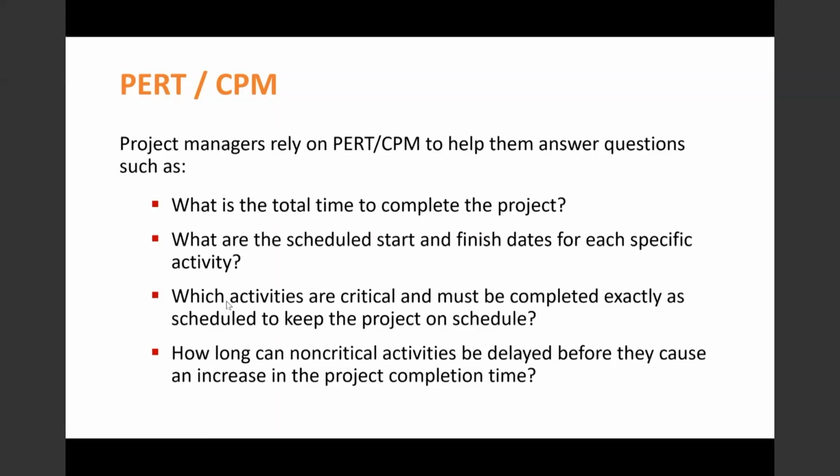Which activities are critical and which are not? If they are critical, then they must be completed exactly as scheduled so that the project can be completed within the stipulated time. And how long can non-critical activities be delayed before they cause an increase in the project completion time?